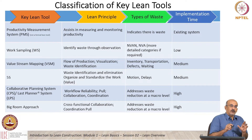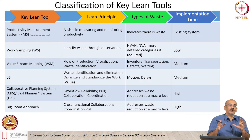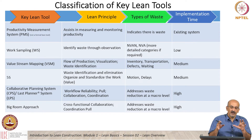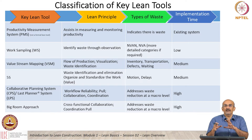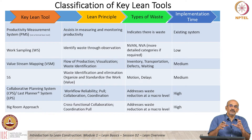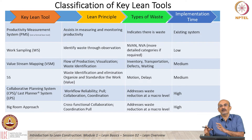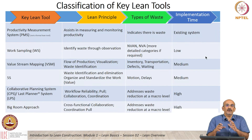When you go into collaborative planning, the Last Planner System, or the Big Room approach, these are larger system-based approaches which address a lot of issues. They look at collaboration, reliability, and establishing flow. They address lean principles in a far broader, more macro sense. While they do not address any specific waste in isolation, they address several types of waste at a macro level and also address the people side of lean. Because there is a lot more participation and more stakeholders involved, the implementation effort is higher, but the benefits can be equally higher if implemented properly.